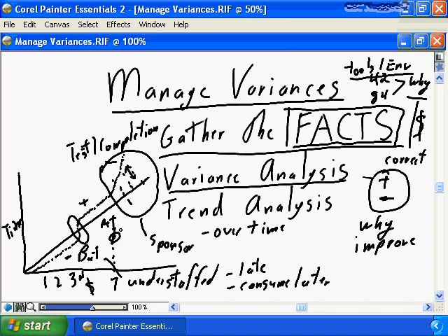It's within the tolerance factor of what my project sponsor, what my project management plan says. I'm on budget if I'm within 5% of budget, or I'm on budget if I'm within 8% or 10%, or whatever your budget tolerance for the project is going to be. So at month 7, you can write another status report that says we're on budget-ish.